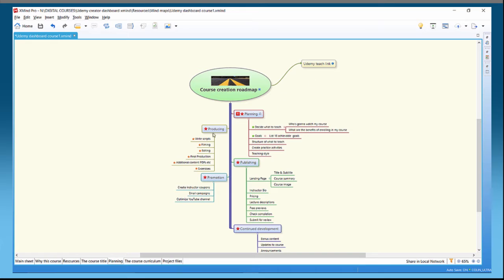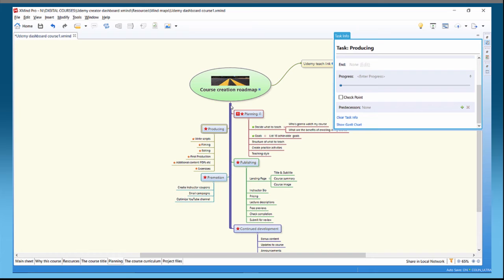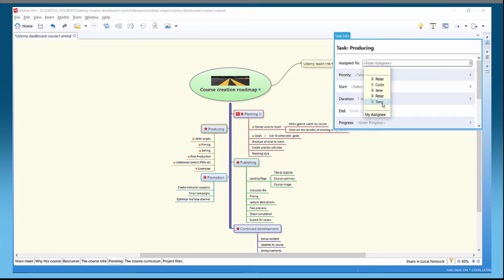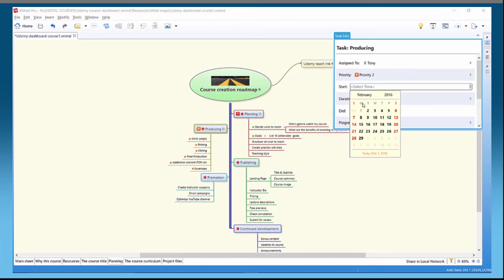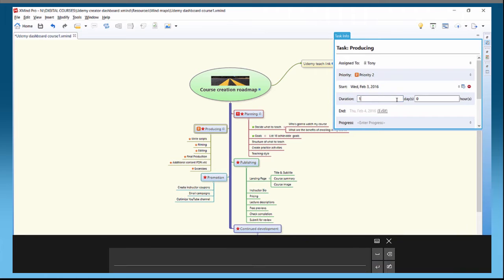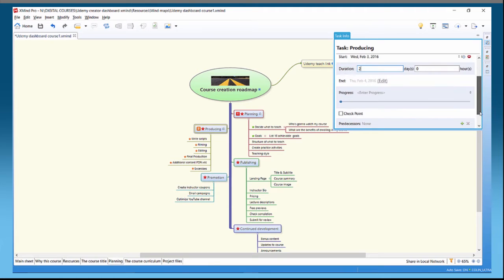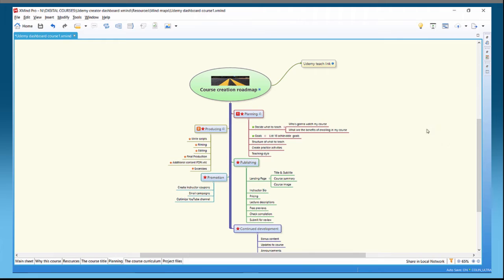Click off the task and you can see a little icon showing that we have task info. For Producing, we press Ctrl+Shift+T and assign it to Tony. Select priority two, set start time to the third, duration two days. Click off and we've got a little icon for task info here as well.